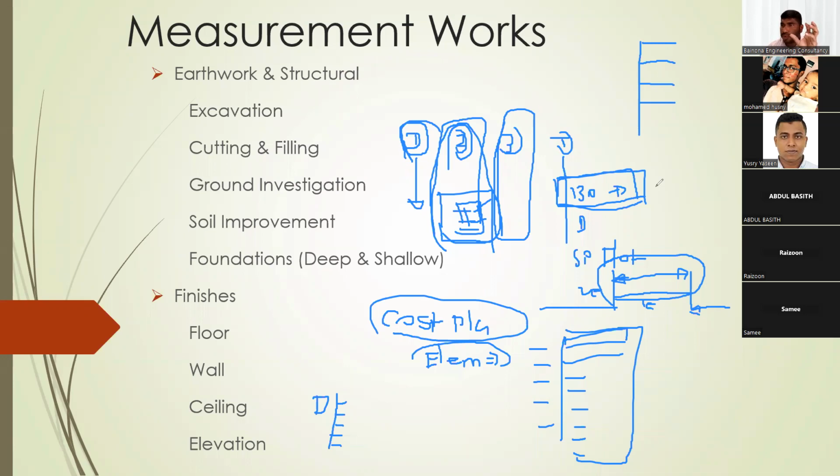They respond to the questions asked by the contractors in coordination with other departments. Other departments mean the engineering department, like mechanical designers, structural designers, architects, and authorities, and in coordination with all these people, they respond to the questions. This is called tender bulletin, or tender queries, or tender clarification, or whatever it is. There are different terminologies they use.